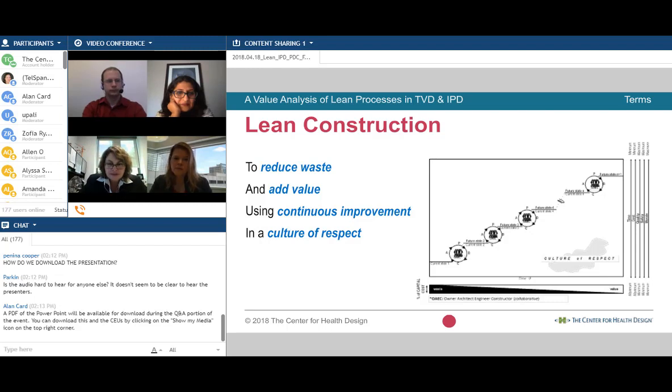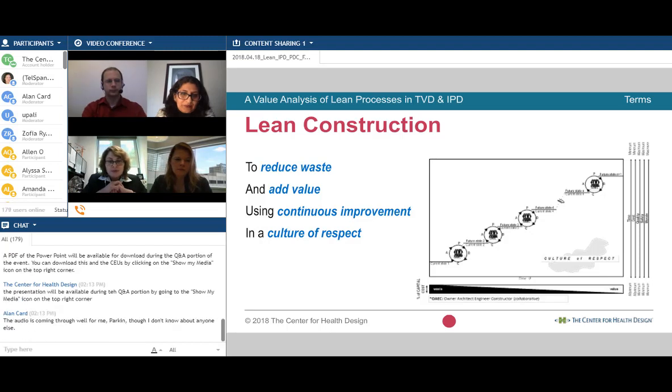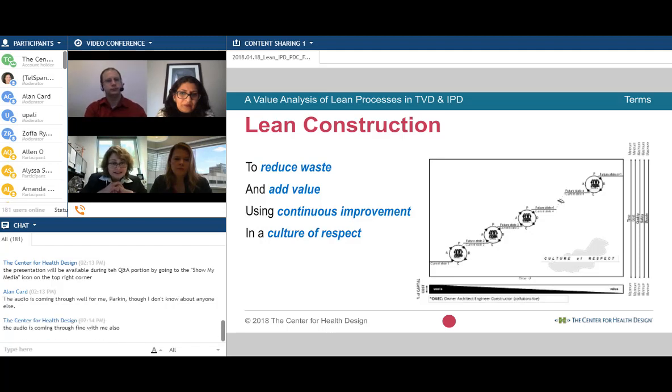Honestly, when we talk about projects, you may have heard of the three-legged stool. We have time, cost, and quality as the three legs, and sometimes we talk about a time-cost trade-off. Many of you are familiar that if you say you want to reduce the schedule, you want to make a project go more quickly, that it costs more. And so the great promise of lean is that it's a paradigm shift. It says instead of saying there's trade-offs, we can actually improve time, cost, quality, and safety and morale simultaneously. And that just means that we have to do things very differently.